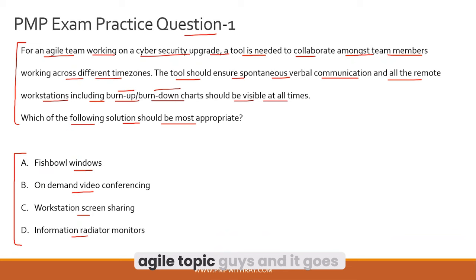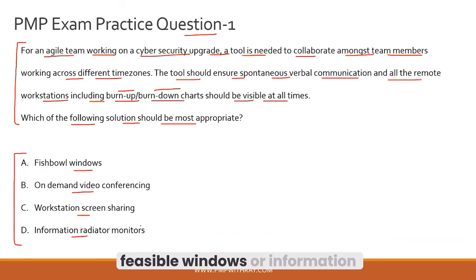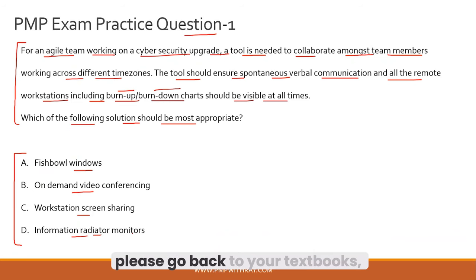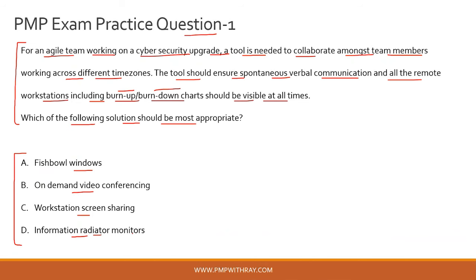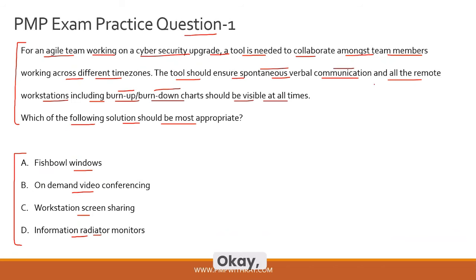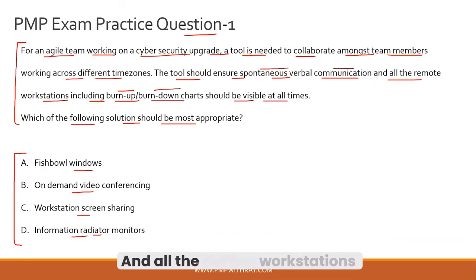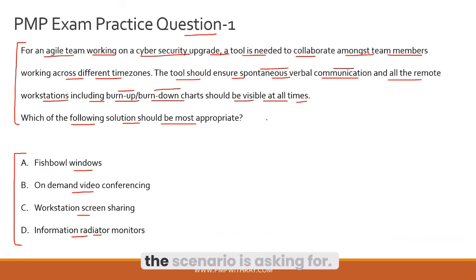This is a question on the agile topic. Terms such as fishbowl windows or information radiators should be at your fingertips when writing the PMP exam. The requirement is that the tool should ensure spontaneous verbal communication — verbal can be virtual, as long as it is verbal. All remote workstations including burn-up and burn-down charts should be visible at all times, so it's essentially a 24/7 window the scenario is asking for.